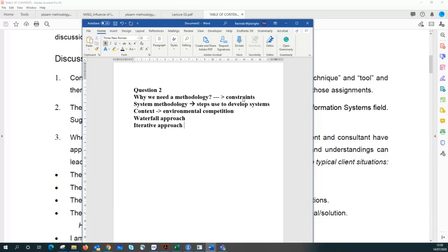The riskiest parts in a project can take different forms. It may not necessarily be the technological aspect. It can be a cultural aspect as well. Sometimes the riskiest part in a project is the organization's culture, because humans, the users, are very reluctant to change, right? So how are we going to overcome that, right? That is what the iterative approach is looking at.